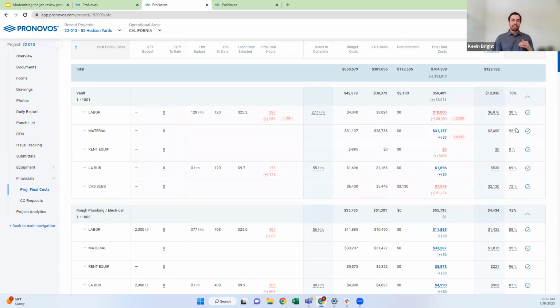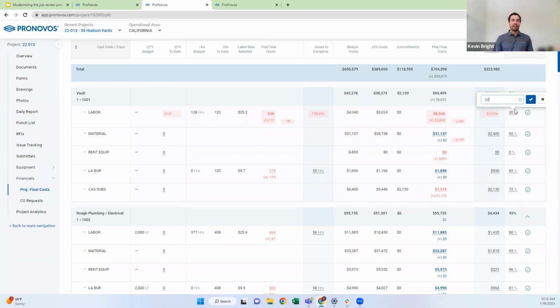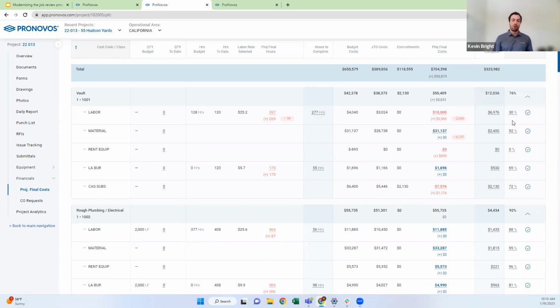The third way is, if you don't necessarily know what your cost to complete is, you may know, gut check wise, what your percent complete is. So if I go in here and say, rather than 30% complete, I am actually 50% complete, it says, all right, if it took you $3,000 to be 50% complete, that means it's going to take you another $3,000 to be 100% complete. So your projected final cost is now going to be $6,048. Those are some of the modifications you can use focusing specifically on the cost side.